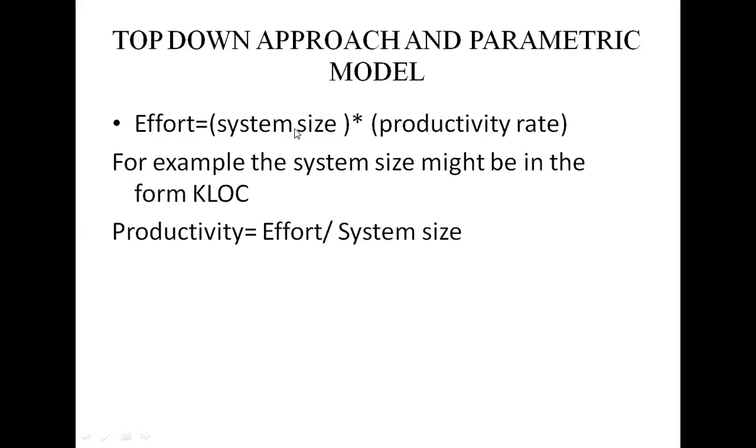So, for example, some person named Ananda estimates a module to be completed as 2 KLOC, and he assessed it would take 40 days per KLOC, so to complete the work it takes 80 days.